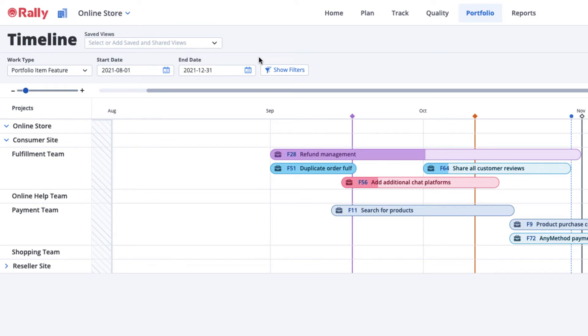Note that if a Portfolio Item doesn't have a planned start date and a planned end date, it won't appear on the Timeline page.